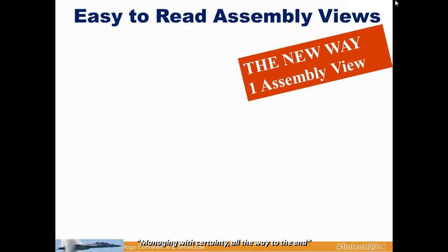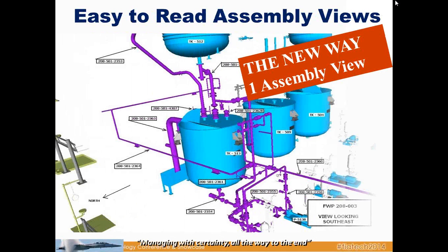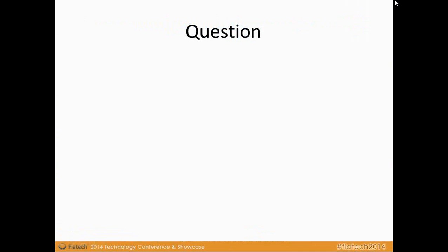There are some other companies that are using ConstructSim that are coming up in some ways. Go ahead and hit the button again. And now we have a model shot. And there's the 13 ISOs, with the spools called out, and the guy can go look at these and say, oh, that's where these things go. So now they have at least some idea how these ISOs fit together and what sequence they need to be erected. So, easy to read views, and again, we are not using model technology overall. Some people are doing a really good job, other people are way behind in the industry. Okay, next one. And you can do the same thing with steel, by the way.